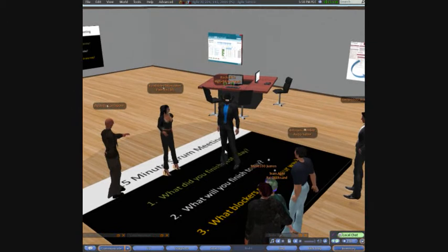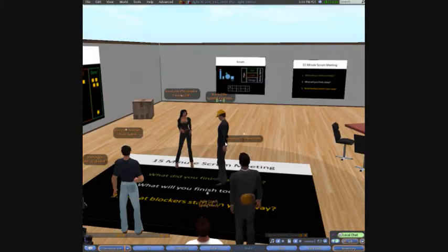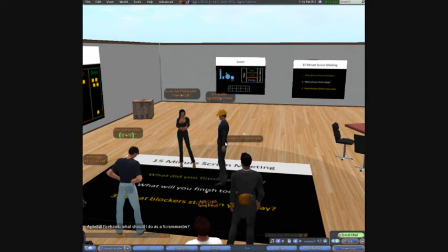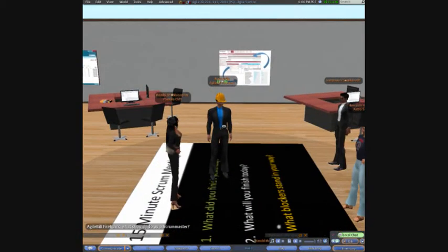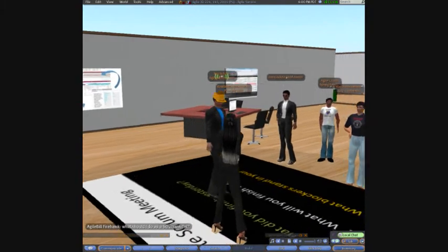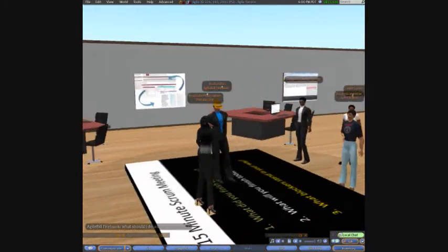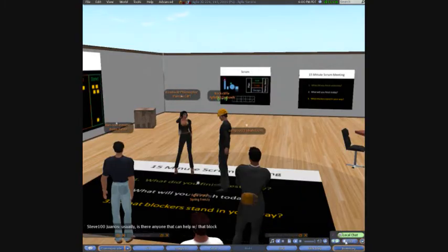Yesterday, today, blockers. What should I do as a good Scrum Master? Pamela mentioned a blocker. Find out what you can do to help resolve it. Bravo. Yep, exactly. So, Pamela, would it help if I pair with you and do some terraforming later? As a Scrum Master, I don't know if I solved her problem, but what I wanted to role play for you and demonstrate is that we wanted to set up some action to deal with the blockers.